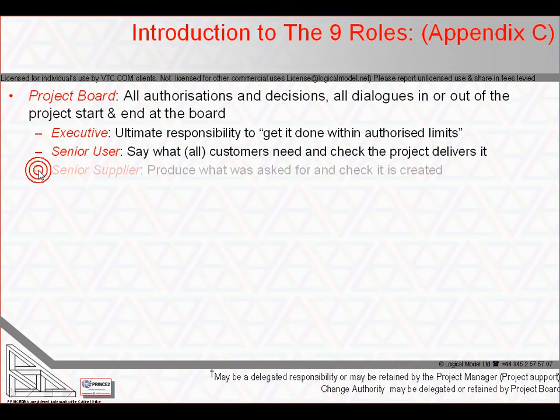The senior supplier represents the interests of those designing, developing, facilitating, procuring and implementing the project's products. The role is accountable for the quality of products delivered by suppliers and is responsible for the technical integrity of the project's products. If necessary, more than one person may be required to represent the suppliers. Depending on the particular customer-supplier environment, for example under a contract rather than an internal department, the customer may also wish to appoint an independent person or group to carry out assurance on the supplier's products, for example to verify liability for staged payments.